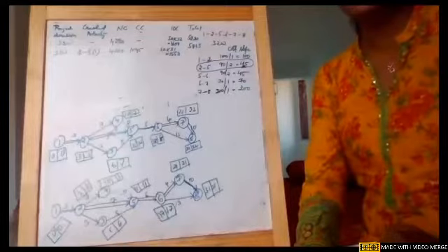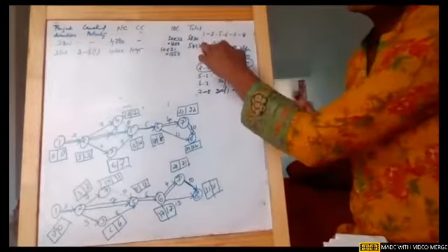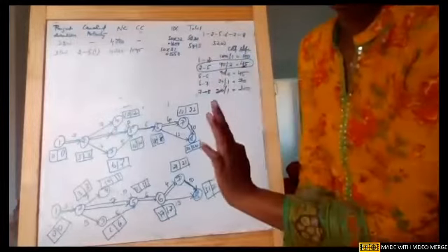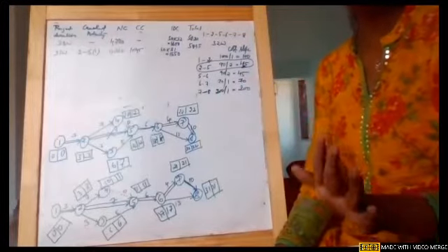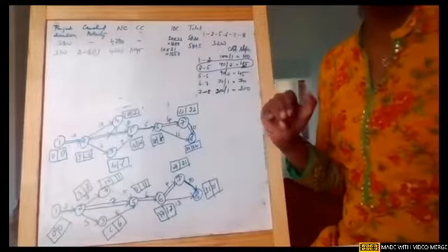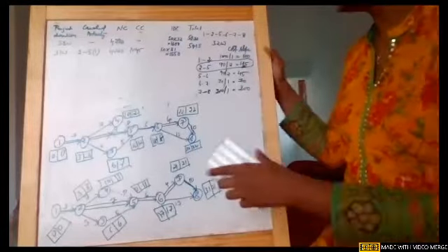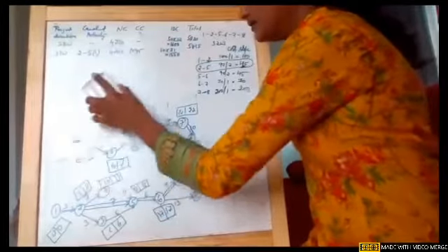That is one step of crashing. Like that, we need to proceed until we check the cost, girls. If it is decreasing, we can proceed with the next step. If the cost increases, we will stop crashing. That's it. Till the cost is decreasing, we need to continue the process. So now I'm just erasing the first network.